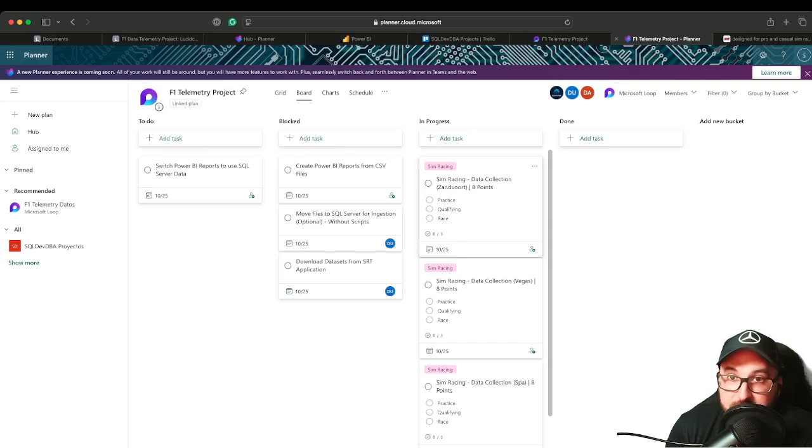The meeting is called a stand-up because the original intent was for people to literally stand together in a circle, in a square, whatever you want, no sitting down, and that applies to how quick the meeting needs to be. This is a meeting that's meant to say, go around the room and tell us how you're doing. Tell us what tasks you completed since the last time we met, what tasks you plan to complete before the next time we meet, and what is being blocked for you. What are your blockers that are preventing you from getting work done?